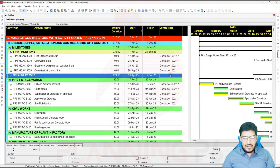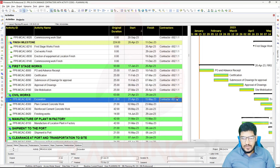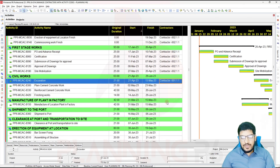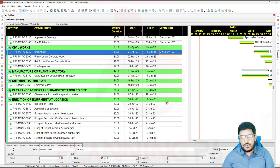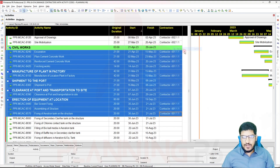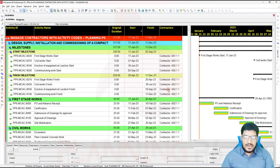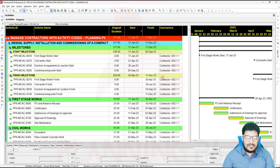You have the option to use Fill Down. For example, use the Fill Down option here. The WBS will not show here, so I will assign some of them. If you assign the main one it will be automatically assigned underneath. While you are breaking into levels of activity codes, assign the level — for example, we created up to level two, so assign level two. I will use Fill Down. Now you can see the contractor has been assigned. The second option is how we can assign codes using Excel, which I will explain as well.